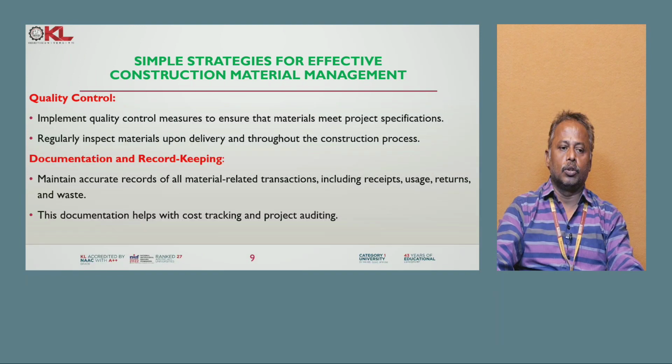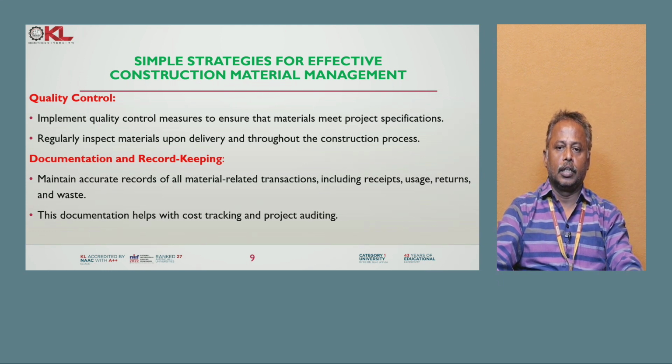Next, quality control. We can implement quality control measures to ensure the materials meet the project specifications. Regularly inspect the materials upon delivery and throughout the construction process. Next, documentation and record keeping. We can maintain accurate records of all the material related transactions, including the receipt, usage, returns and wastage. This documentation is very helpful for cost tracking and project auditing.